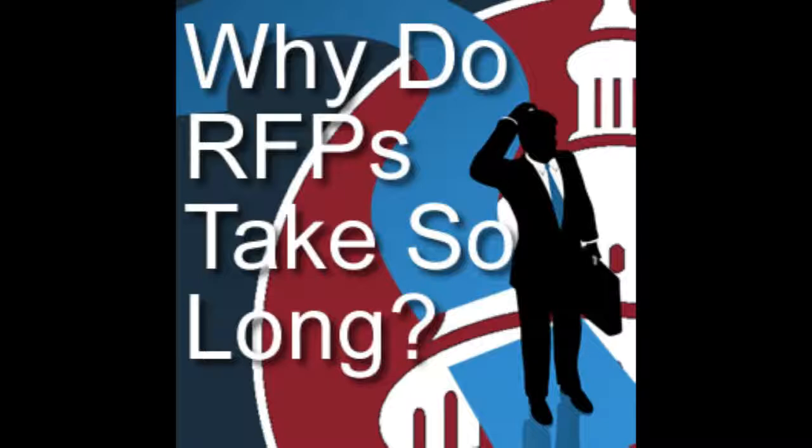If you're buying something that's going to be used by the whole Army, man, you've got to go up to the top levels lots of times if it's got to meet lots of people's needs and it's a lot of dollars. And then imagine if you're trying to buy something that's going to be used throughout the DoD, a multi-agency buy. Now you have to get the top people in several different agencies to approve. How long is that going to take you to prep all the paperwork and to do all the individual briefings? So this may not be very pertinent to small business requirements, but I think it is a good example of how who the approver is drives how much time it takes to just get an RFP out the door.